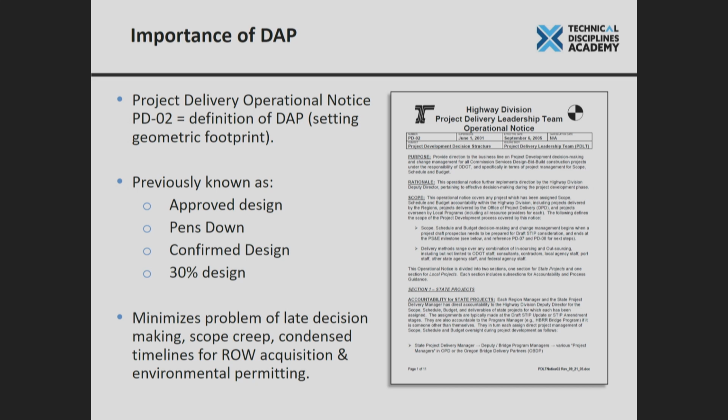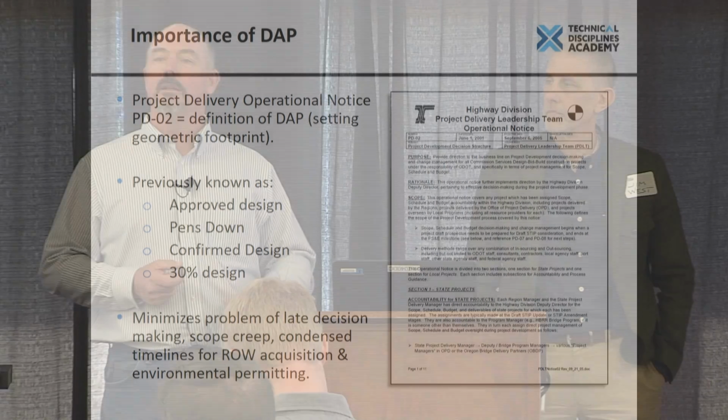And the same thing with environmental permitting. You have a footprint, you figure out how much cut and fill you have, what your impact is going to be to the aquatic arena. You reach out to your regulators, you're halfway through that, and you're like, oops, nope, we need to shift this, more fill going in, or we're now going to need to affect a potential ARCI resource that you weren't engaged in early in the life of the project.